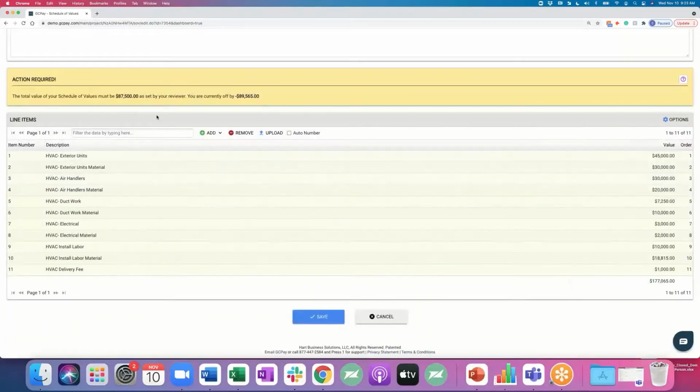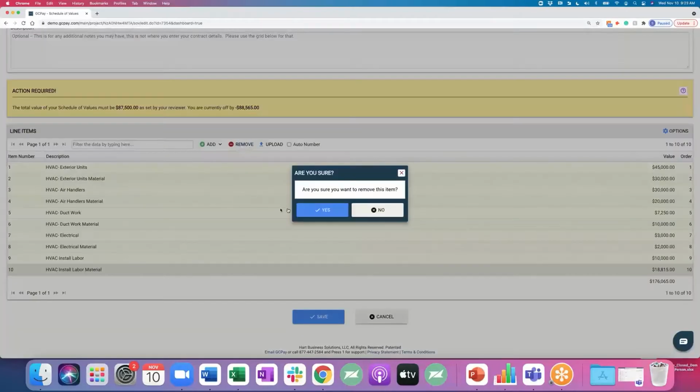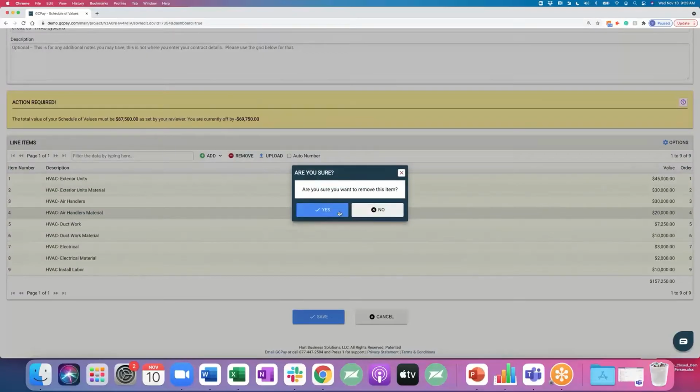So we'll notice here, this is a really great real life example of things that can happen. I upload, remember my schedule value must be $87,500, but I uploaded something that was overbilled by $90,000. So it would not let me save this to your team, which means never again do you have to worry about anything being overbilled. I'm not sure why this one uploaded like this, but it makes me actually remove some lines so that your team never again has to worry about anything being overbilled. I'm just going to remove some of these.